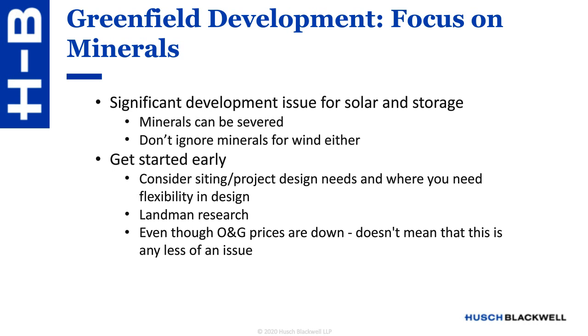Even though, as we saw, oil and gas prices are down right now, that doesn't mean minerals are any less of an issue for you. Financing parties are always focused on that. Title companies are focused on it. The mineral rights are dominant over the surface in many cases, and mineral owners are also fairly savvy. If you wait and don't start early, that can really increase the leverage of the mineral owners and the mineral lessees, which obviously isn't what you want.